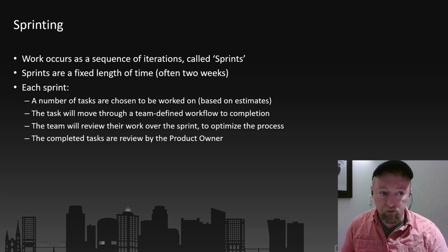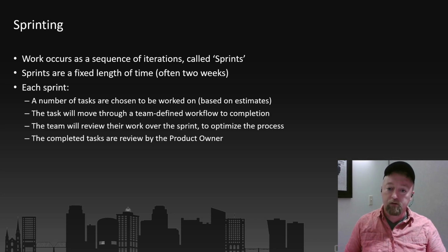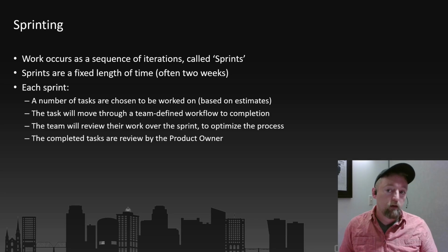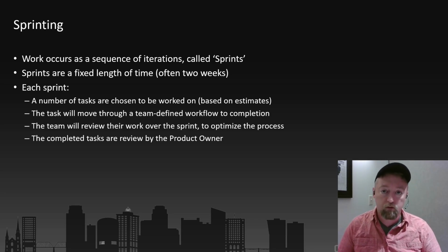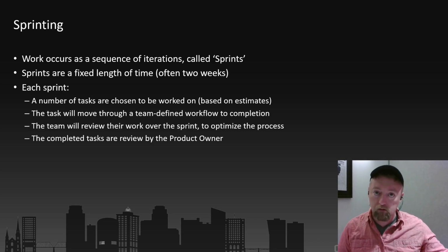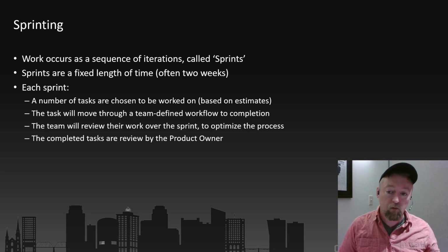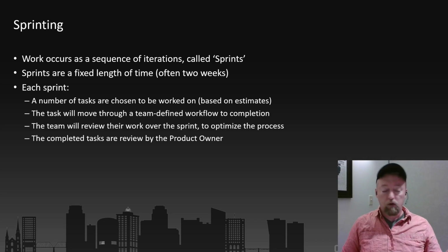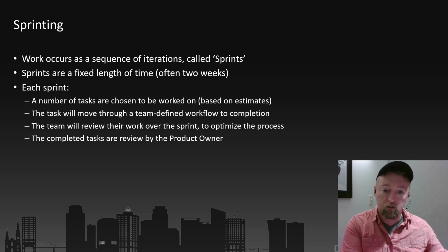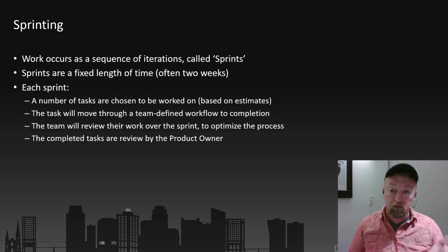And so, yeah, we just review what we've done so far and where we're going, and we're making sure that we're on track. And this is also the opportunity where we can make adjustments. If it's turning out that these things are taking longer than we expected, it's an opportunity for the project owner to say, I really wanted to hit that timeline. I really wanted to hit that release date. So maybe we need to cut these other features in order to get it released in time. Or, we did the feature this way, but I think users will actually like it a lot more if we did it this way. And so we can make those kinds of adjustments as we're going.